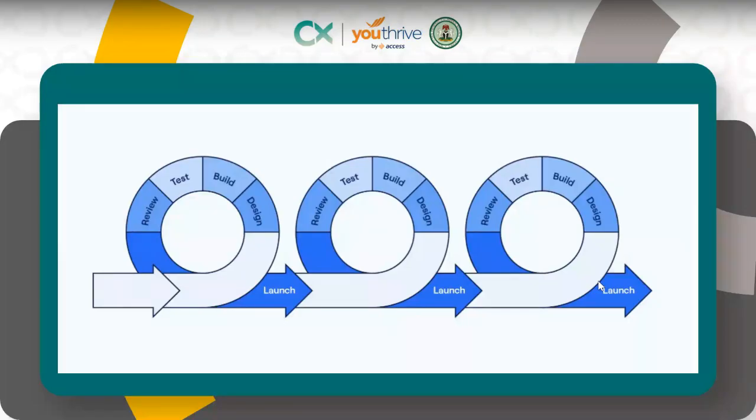Imagine in waterfall, which is linear, you spent 3 months, or 2 months, or 1 month designing. Of course you got your feedback, but then you use another 3 or 4 months to start developing. No testing was done, nothing. After the 3 months, you use another month or a few weeks to test. And when you now test, you realize that there are some things that should have been improved or refined.